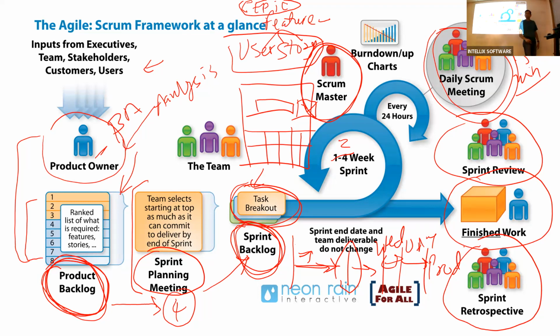Won't that be changing the user story? No, they will not change user stories. It's locked. Because if they change the user story, the design changes and they cannot deliver within 2 weeks. So what they will do is create a new user story and put it in the product backlog. In the next sprint, if it's very important to the business, they will pull it into the next sprint and then deliver. But they will not update the user story in the middle.